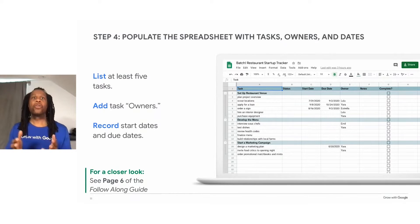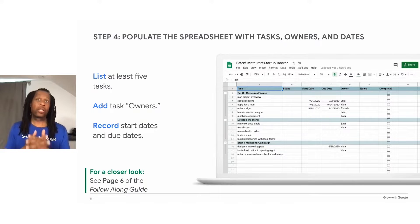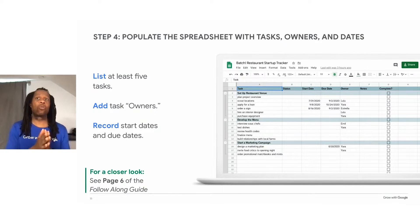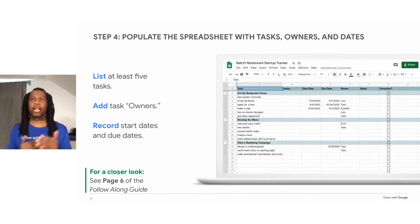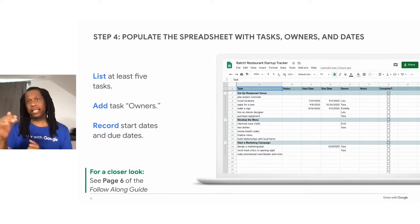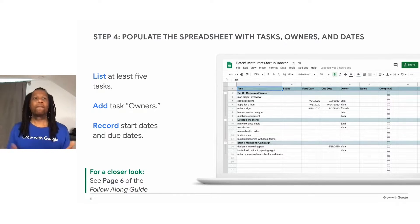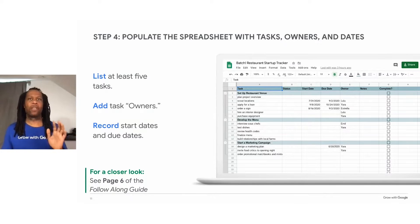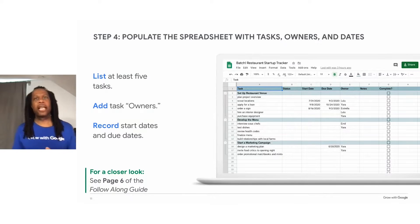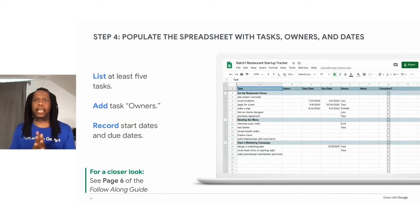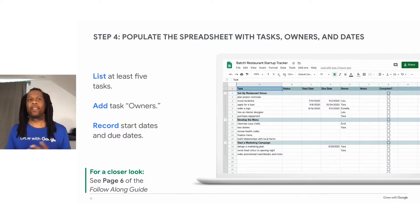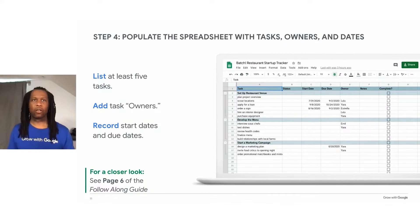Now, you can use this column to keep track of the task as you assign and easily gauge how much work each team member has to do. So you can actually kind of balance the load by seeing someone's name too many times. Finally, list at least a couple of dates. You can record the date when you start the task, and then when you plan to finish it. And of course, these can always be changed as you are adjusting accordingly.